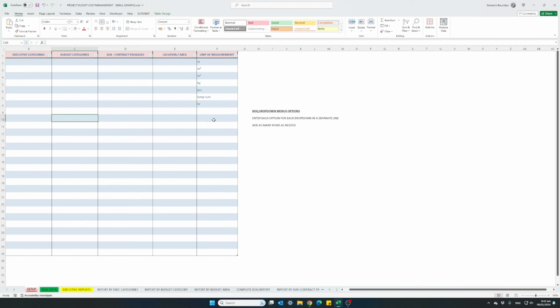This is automatically updated in our final cost projection. Basically, contracts supersede the original budget estimate. We had an estimate, then we prepared a contract with a subcontractor, and this price now is our cost projection.